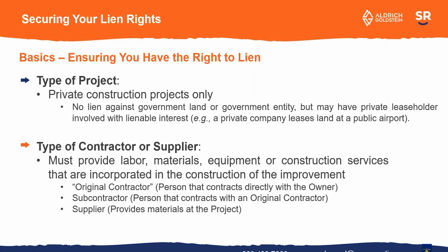If you're working on a project that's on government land, you may still have a lien if it's a private construction project. That's where you want to make sure that you do all of your research ahead of time so that you're not stuck trying to figure out how to lien something when you're starting to run out of time.